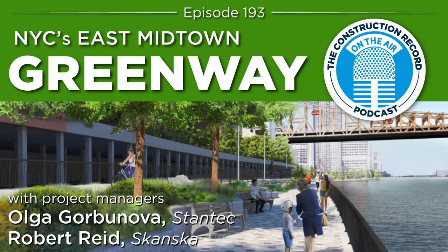And we actually used one of the largest marine cranes on the East Coast to get this in. It wasn't necessarily a heavy load to pick the bridge. It was actually a pretty light bridge compared to the size. It just had a very long reach, working around the Esplanade and the other activities that we had going on. But everything worked out well with that task, and I think it's all due to the early pre-planning.